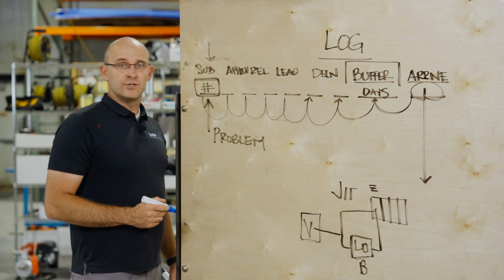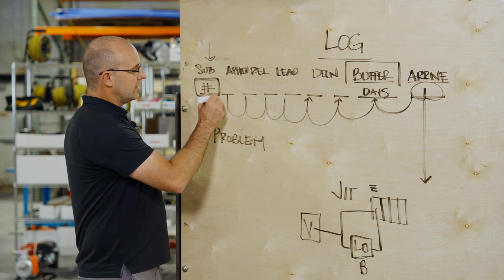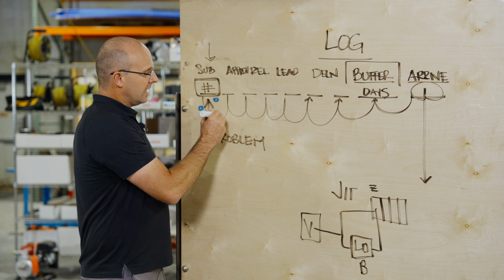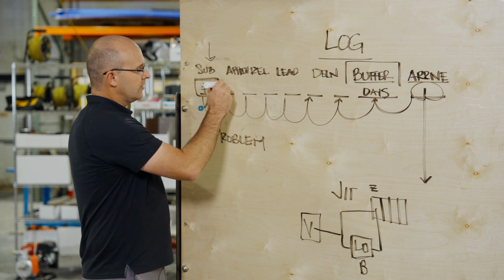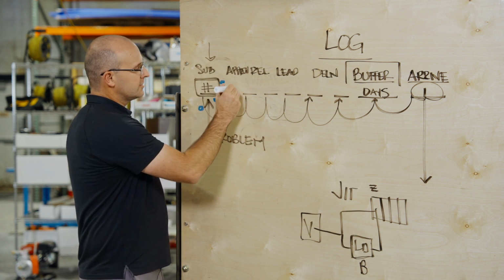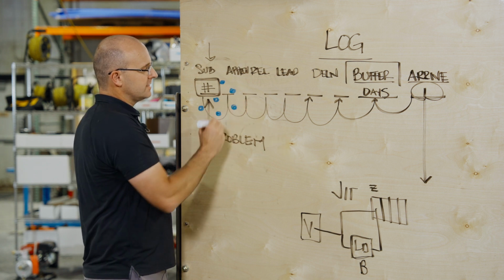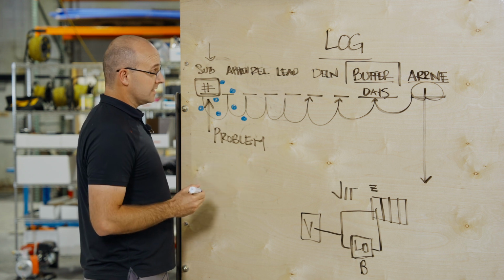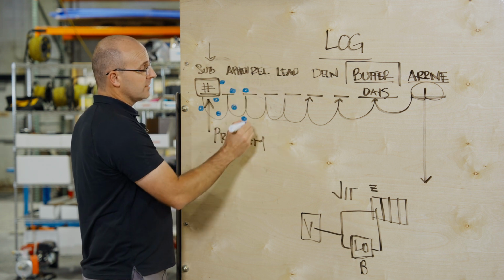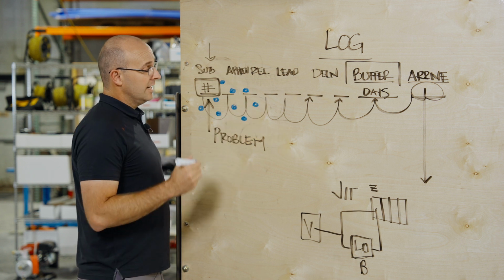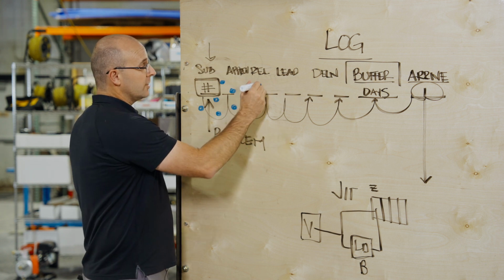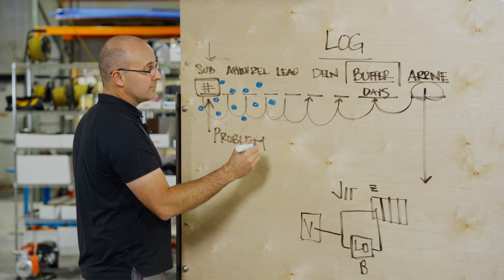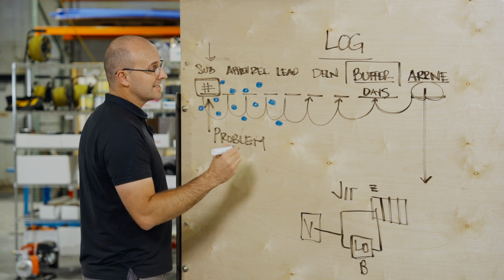And I won't go into too much detail with this, but you can help the trade partner. You can turn and flip the pages with them. You can isolate a smaller portion of work. You can hire additional help. You can talk to the designers. You can do a Bluebeam session. You can actually dive in and do a real-time review with the designers. You can confirm that it's been released. Source out the right manufacturer from the beginning. You can go fly and visit the shop. You can supplement the actual fabrication. You can make sure it's put in the exact ideal order.